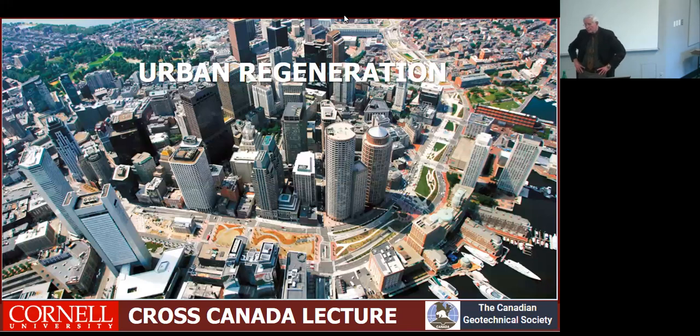Sure. But the perception I'm getting as a designer trying to bid with these things is, yeah, it could work, but the certainty of getting the right strength, the right overlap between columns, the certainty of your parameters in general is deemed less than, say, a secant pile wall or a slurry wall, where you can just control the strength of your wall by design, and then control your costs in the bid. And we end up not having these items in bids just because the contractors don't like the lack of control. Is this something you're familiar with, or do you think that it's just because it's a new technology? Like some of my British friends say, horses for courses, right?